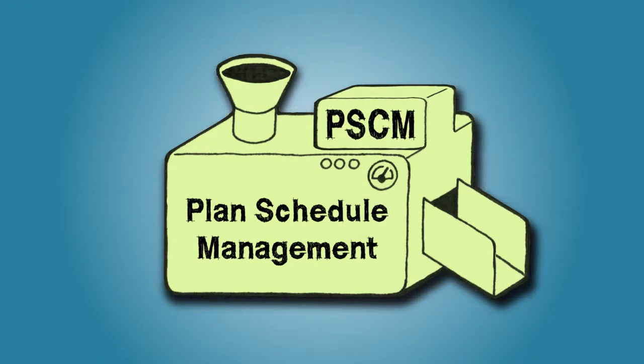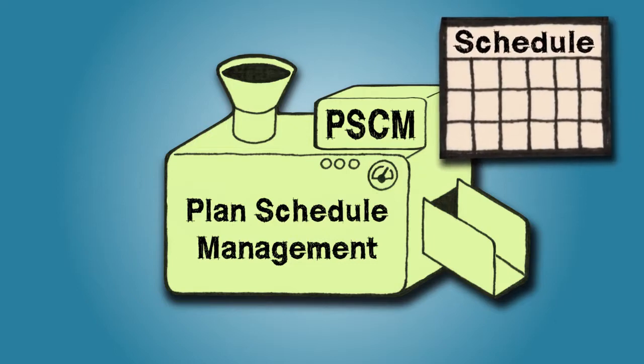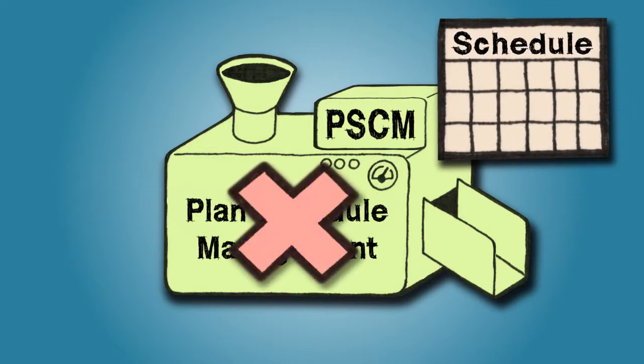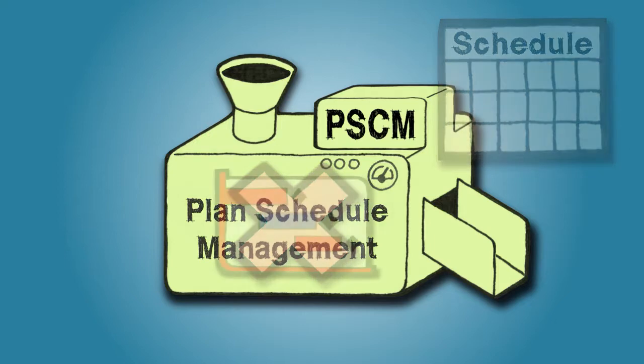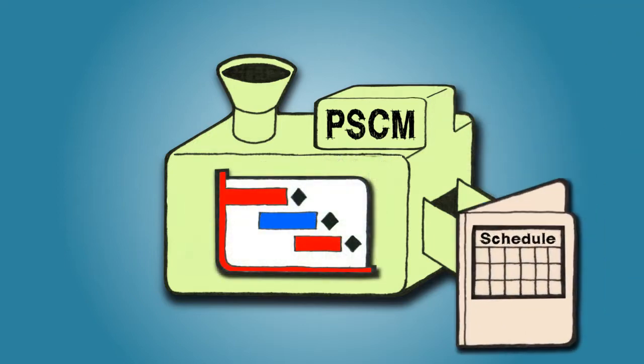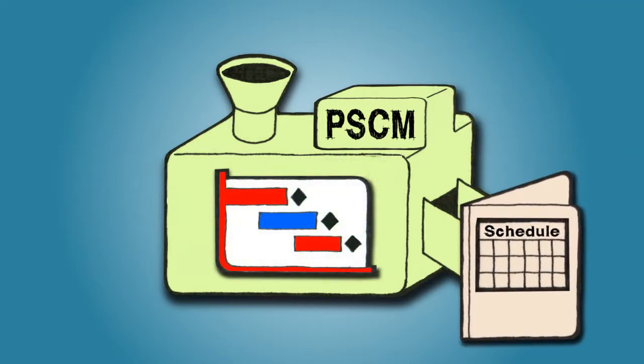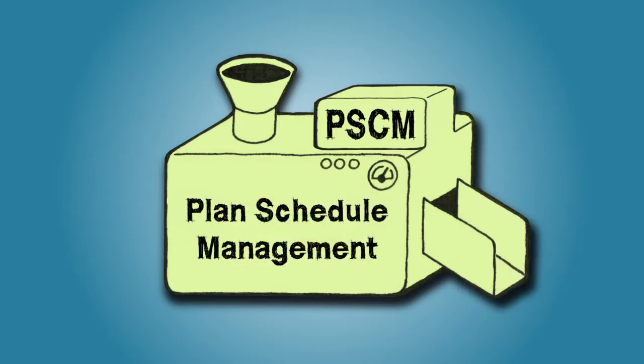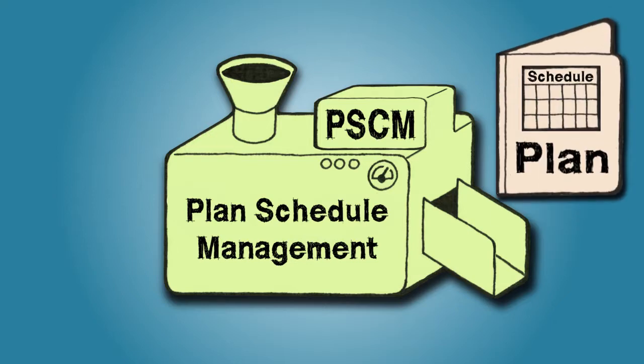The planned schedule management process. It's not unusual for a particular event in a project to run behind schedule. This can cause a need for the next scheduled task or even the whole project to be changed in one way or another. The planned schedule management process determines the criteria the project manager will use in developing and maintaining the actual project schedule. Its output, the schedule management plan, is a subsidiary plan of the overall project management plan.